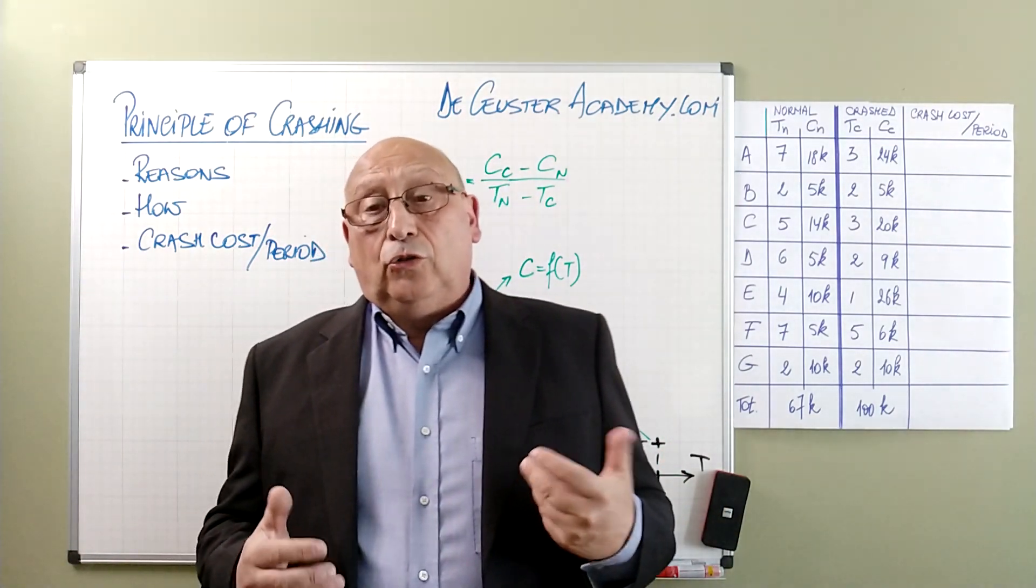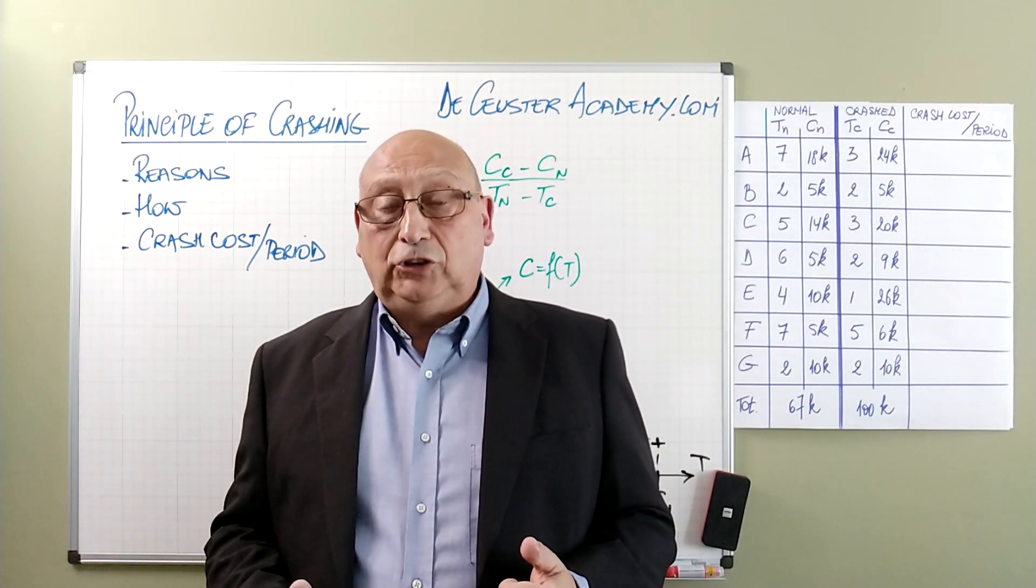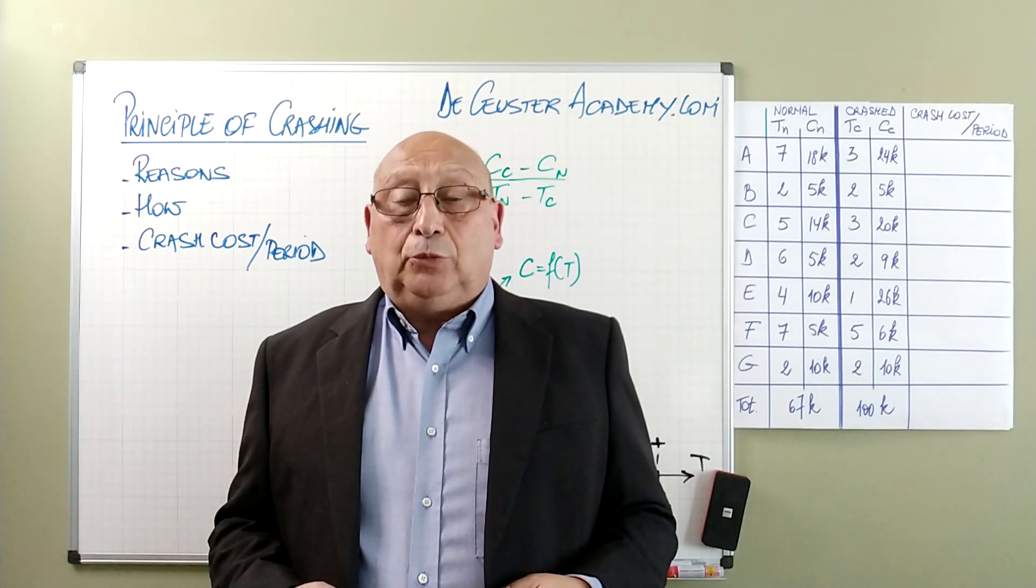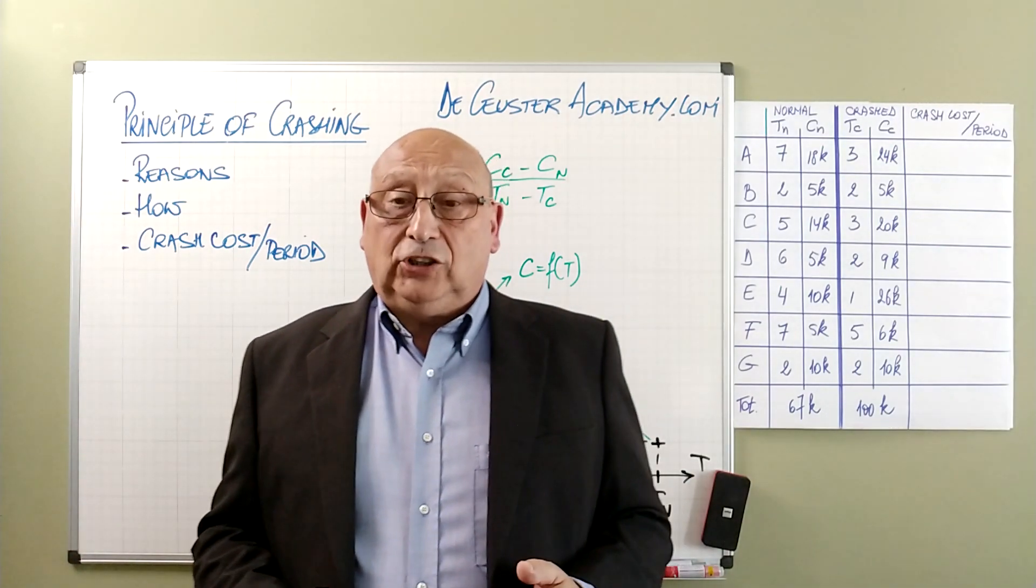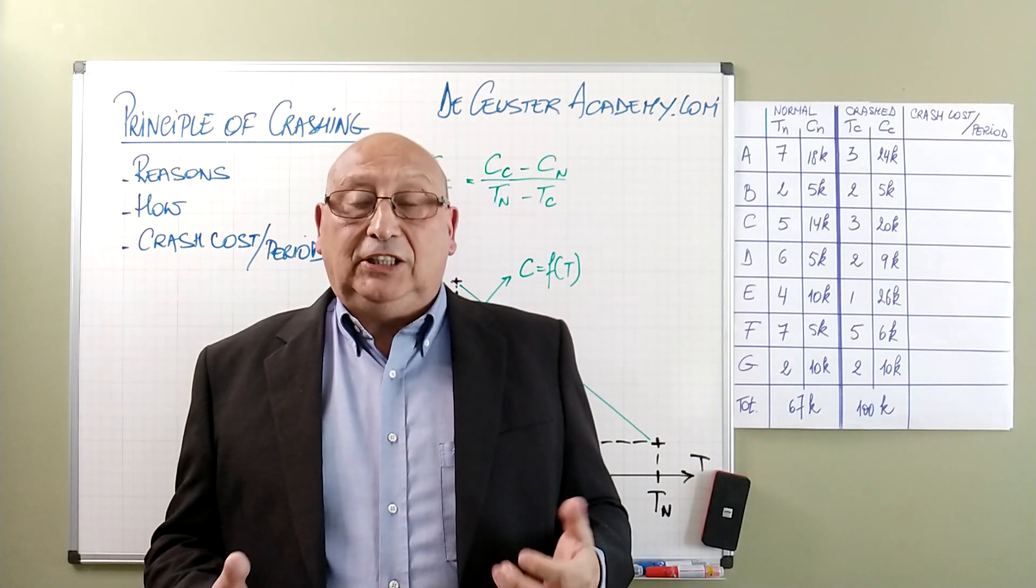In the table here we have an overview of the normal duration and the normal cost of the activities of the project. Next to that we have a table with the crashed duration and the cost when we are going to crash those activities.